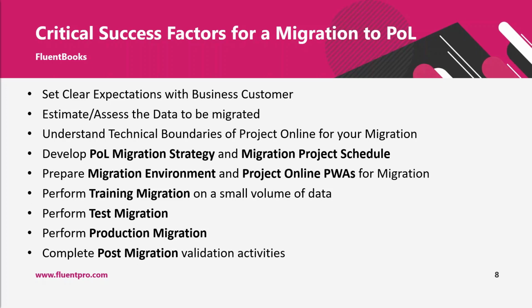And after training, we always advise performing a test migration to a test PWA. And it is always good to migrate the whole volume of data. This is done not only to get a clearer understanding of how long the migration would take, but also to catch some data-specific and environment-specific issues, if any, and prepare correction and mitigation plans before you start doing production migration.